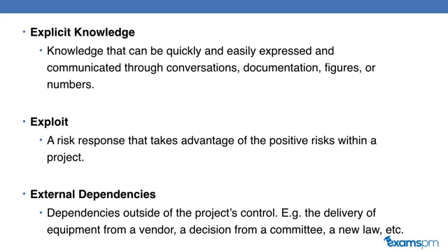External dependencies. Dependencies outside of the project's control. For example, the delivery of the equipment from a vendor, the decision from a committee, or a new law that's being enacted.